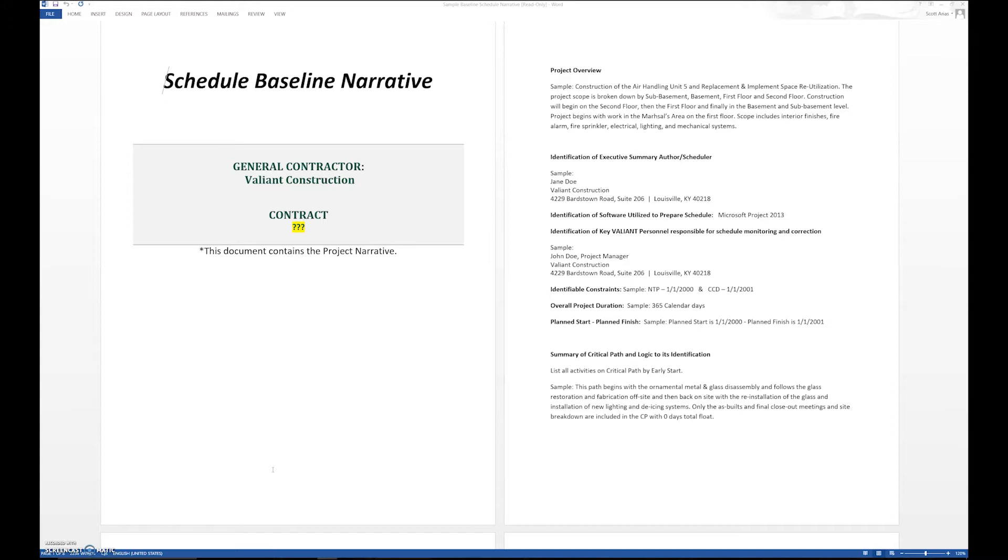Step number 18 is the narrative. Now you can see we're going to create a schedule baseline narrative. There's only so much that can be understood from creating a Microsoft Project schedule. You have to have a narrative associated with it.